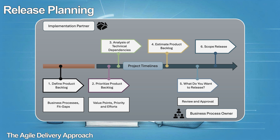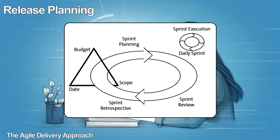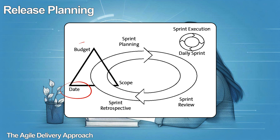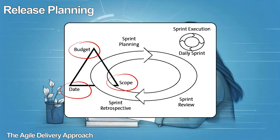After the dependencies are identified, there will be an estimation and completion of the work to be done. Upon completion, the product owner, in partnership with the business owners, will review the work, provide feedback, and either approve or reject the sprint. The scrum team will then create the working product release. The team reviews the three release constraints — scope, budget, and dates — and updates them if necessary. These constraints dictate the release plan. The initial release plan often happens based on fixed scope during the proposal phase. In the explore phase, the product backlog is ready with prioritized user stories, and the team completes release planning, creating a list of product backlog items known as a sprint map.